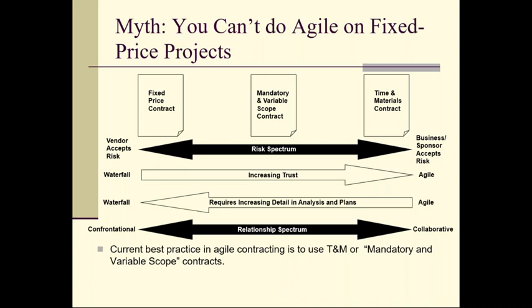So those are two extremes. One is an hourly based fee, and there's no real end. It could be 1 hour, it could be an infinite number of hours. And the other one is a fixed amount of money for a fixed piece of work. And there's hybrids and things like that in the middle, but those are sort of the two extremes of how you can look at contracts. I'm going to spend a little bit of time looking at those through different lenses. So from a risk perspective, a fixed price contract typically means that I'm going to, as the buyer, transfer all the risk to my supplier. The supplier or the vendor of services takes on all of the risk.